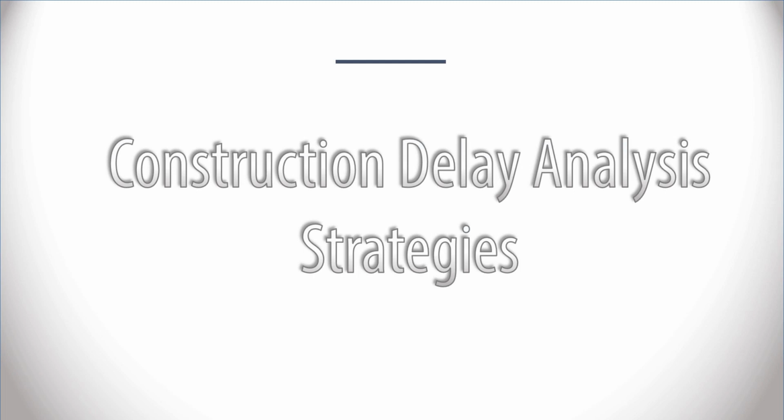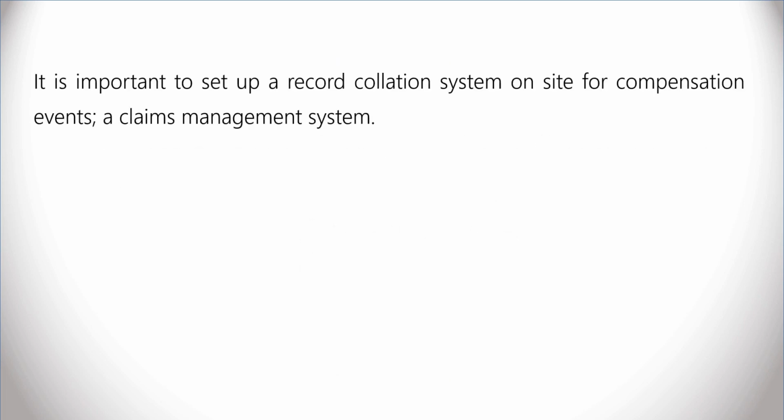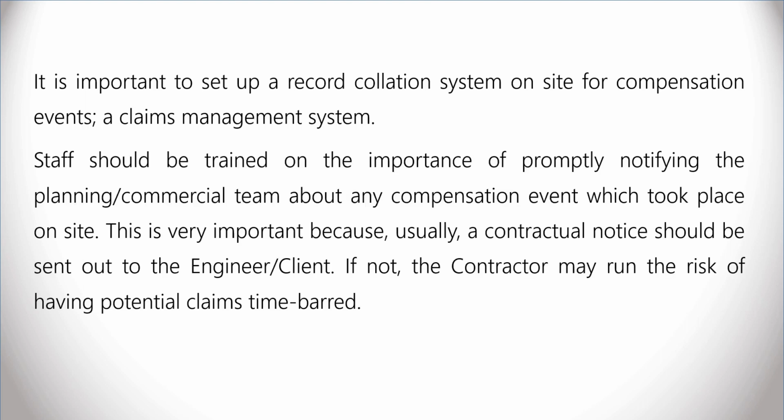Construction delay analysis strategies. It is important to set up a record collation system on site for compensation events, a claims management system. Staff should be trained on the importance of promptly notifying the planning or commercial team about any compensation event which took place on site. This is very important because usually a contractual notice should be sent out to the engineer or client within 28 days or any other time period specified in the contract. If this is not done, the contractor may run the risk of having potential claims time-barred.